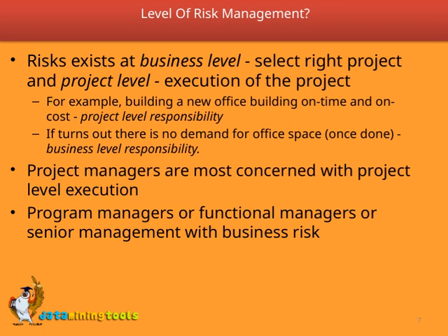So, when we talk about the level of risk management, it's crucial to recognize who is responsible for what. The project team handles the project-level risks, while higher-level managers oversee the strategic business risks. Understanding this distinction helps us better manage risks effectively across all levels.